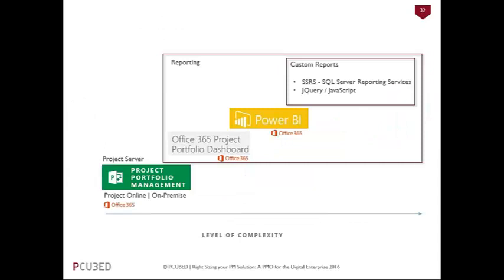So, Jamie, if you go to the next slide, again, we're talking about Project Server. Do I need Project Online, or should I go with on-premise? To make that decision, there's really two different factors, and the first one is all around reporting. In your current organization, take a look at the reports. How robust are they? How many are they? Are they very complex? And if they're not, what I would lean towards is the Project Online.